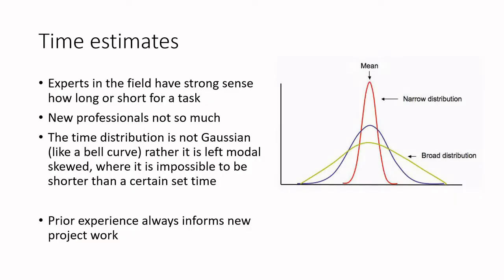That's the benefit of experience, but it also goes back to team dynamics and being confident in the work you need to do. Experts have a strong, narrow sense of how long or short a task should be. Newer professionals don't have quite as much experience, so there has to be some give and take — their range of estimates tends to be much broader.